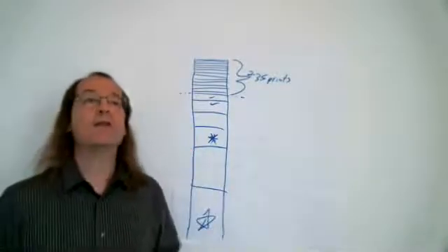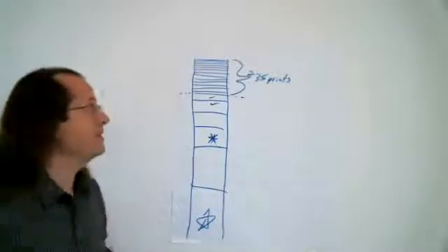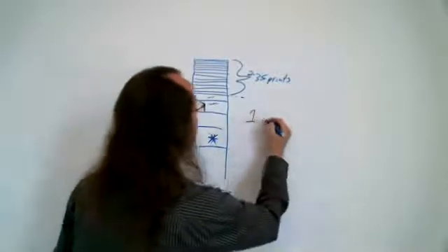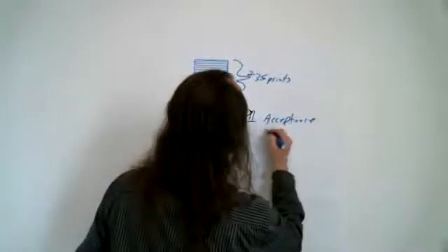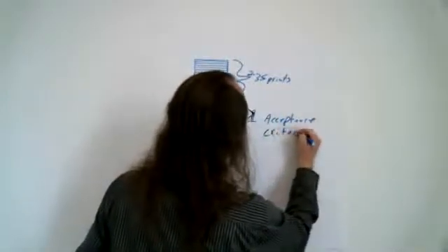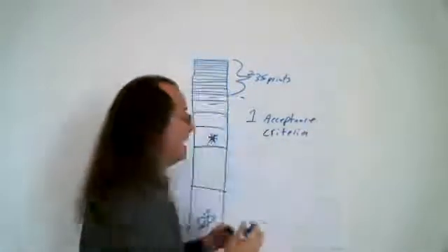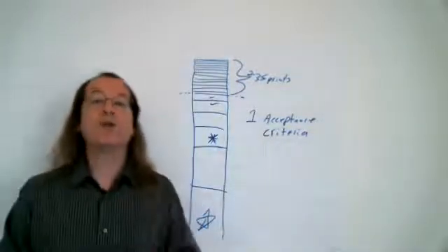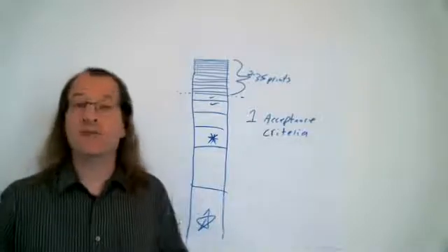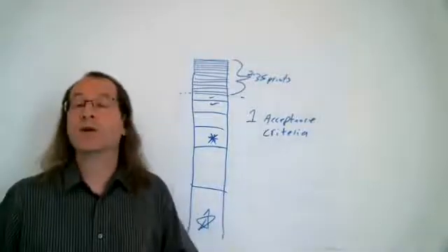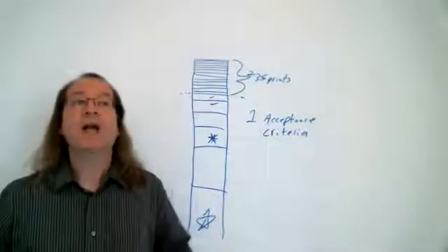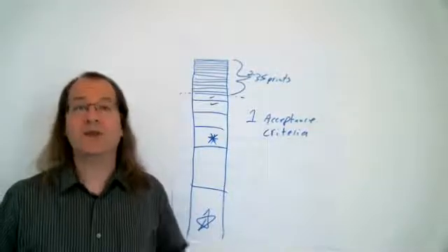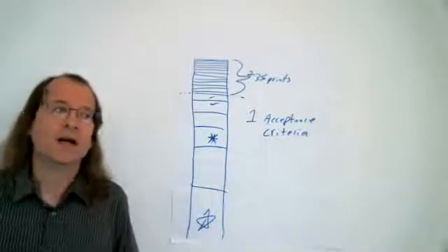The first is discussing and agreeing about the acceptance criteria. So what are the acceptance criteria for each of the stories that we talk about? And we're either determining what they are or refining and evolving them, right? When we break a big story into smaller stories, those smaller stories get more refined acceptance criteria.